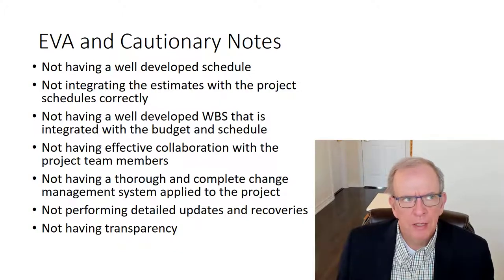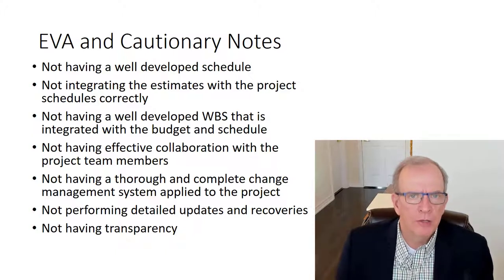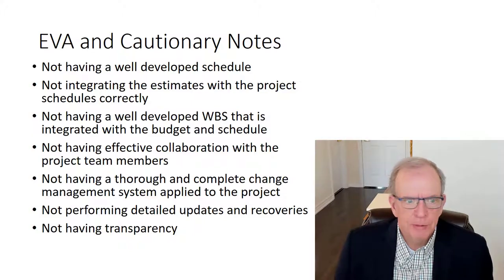You can't be starting to run projects with earned value analysis if you're having trouble developing a baseline schedule, if you're having trouble cost loading a schedule and doing cash flow statements and an effective work breakdown structure and assigning budget codes to the work breakdown structure. If you can't do that, then you're not going to be successful. And also making sure all the best practices in scheduling are covered.